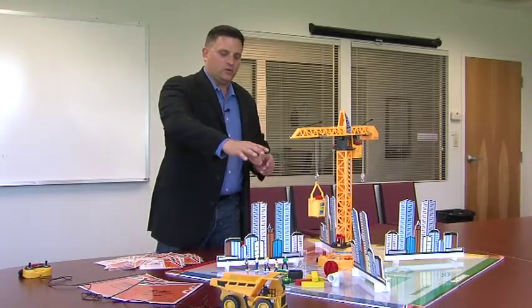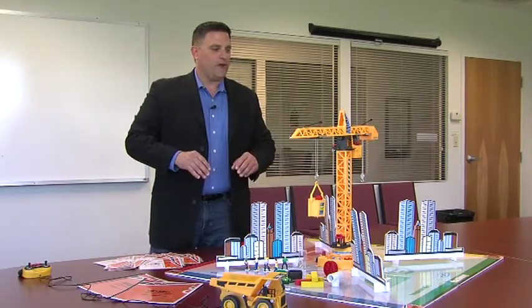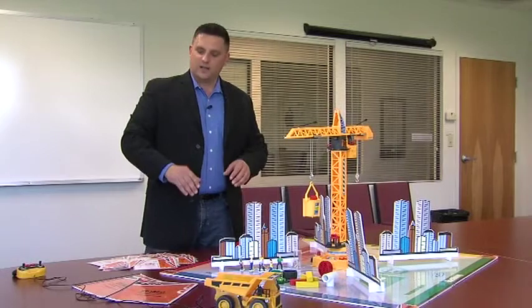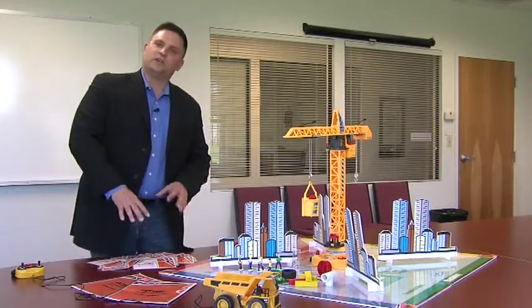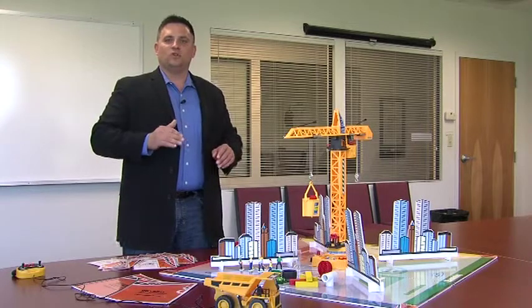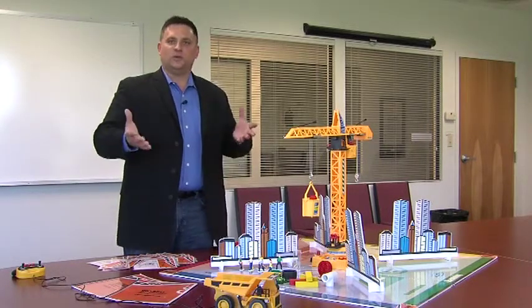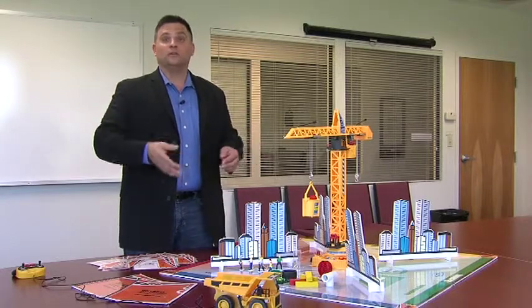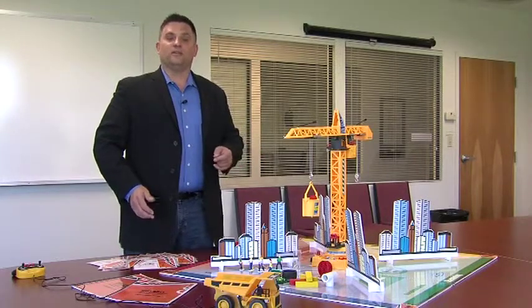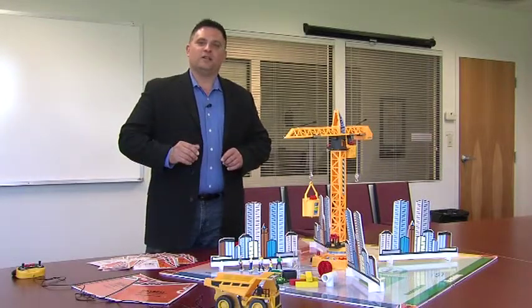So some resources will kit and stage the spare parts that we'll need. The crane operator will get practice at driving the crane or driving the truck. And planning personnel will take all of the work orders and develop a detailed Gantt chart that lays out the sequential order of the work orders to be accomplished and balancing the resources so that we don't have a resource overload or underload as we're progressing through the outage. After that 2-hour planning period, we'll start the outage for real.